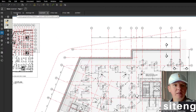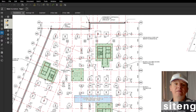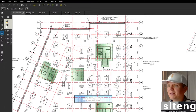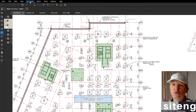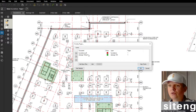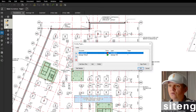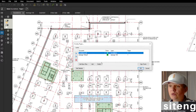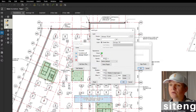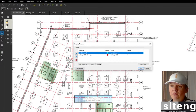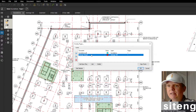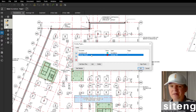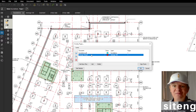So what I'm going to do is overlay the drainage drawing over the foundation drawing and show you how to use it in Bluebeam. You go to Documents and there's an Overlay Pages option. It's going to ask about the colors. For the foundation, I'll use light blue, and for the drainage, I'll use red so I can see it clearly on the drawing. We can obviously add another drawing, but I think this is well enough.